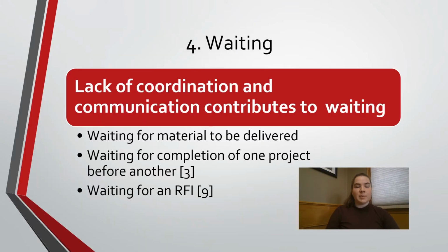A lot of time gets wasted in the construction process when lack of coordination leaves a party waiting. Projects rely on the completion of one activity before the start of another, which can lead to a gap in time if one crew is delayed by waiting for another to finish their part. Waiting for materials to be delivered also causes delay. Beyond the construction process, waiting for RFI communication, timesheets for payrolls, and all other forms of any sort causes delay in the overall process.